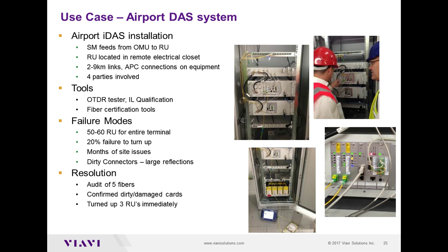And what happened when they brought it up, there were 50 to 60 radio units there, and there was a 20% failure, because people assume, I see the green light and I have a cap on the fiber, everything will be fine. I just hook it up, power it up. As soon as they powered it up, there was a 20% failure. And because of different parties working and the time frame, accessibility, whatnot, months were wasted in the whole process.